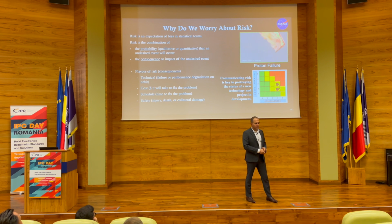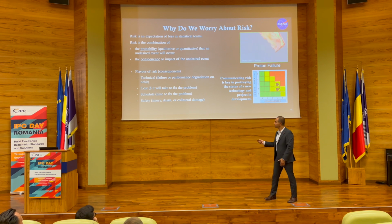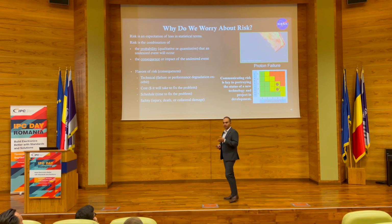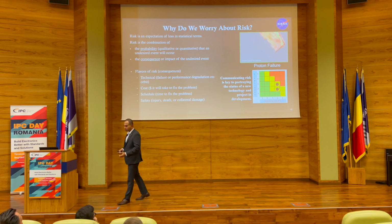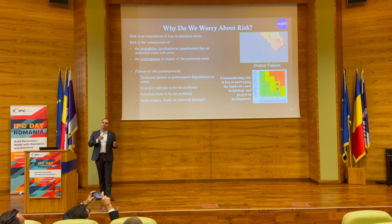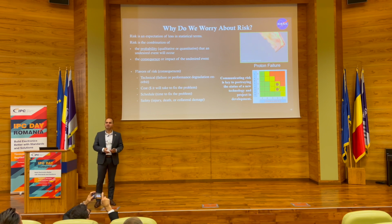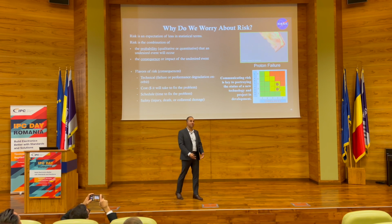And in our work and in many other organizations, risk is identified and then communicated through a fever chart. Here you can see likelihood is on one scale and the consequence is on the other scale. Because as you can imagine, in an engineering world, in electronics manufacturing, certain failures can be extremely low probability. Think about some projects that you're working on today. They may be very low probability failures, but the consequence could be very, very high, right? So you would put that likelihood on 1, but the consequence could be 5. So that would be a 1 by 5 risk.